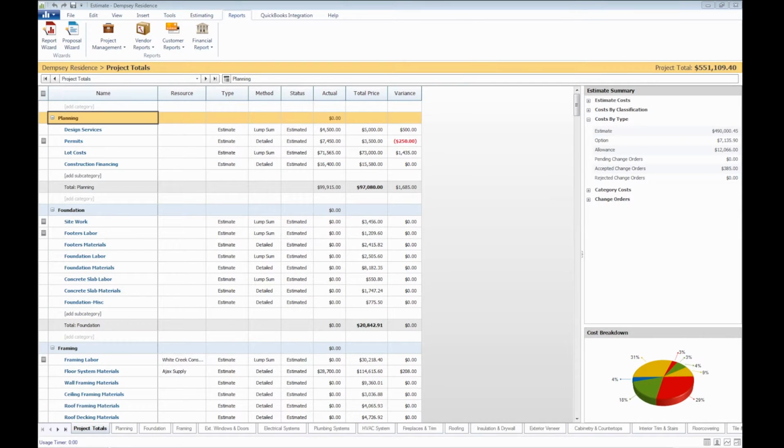For those of you who are unfamiliar, allowances are simply going to represent the budgeted amount for a specific subcategory that's typically left up to the client or the subcontractor to decide how the money is spent. This will usually include all costs such as labor, materials, or other fees for the subcategory. And if the total price for the subcategory costs more or less than the allowance value, then typically the original contract sum should be adjusted to reflect that change.